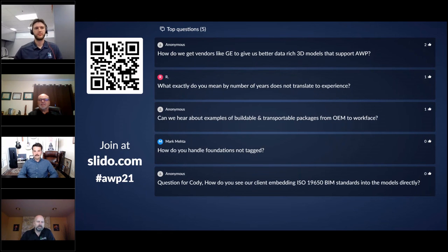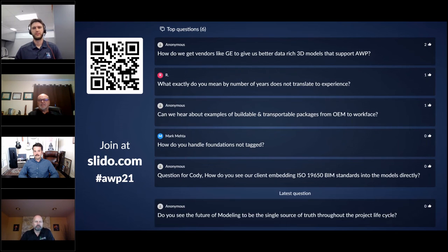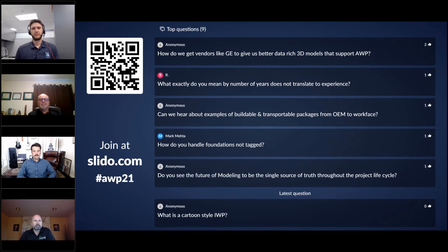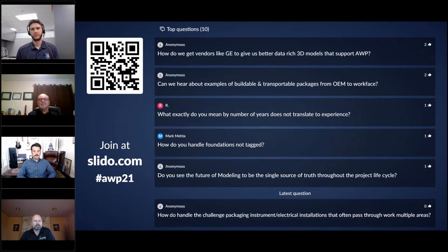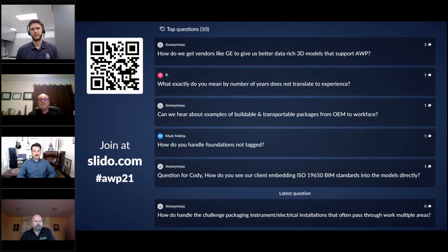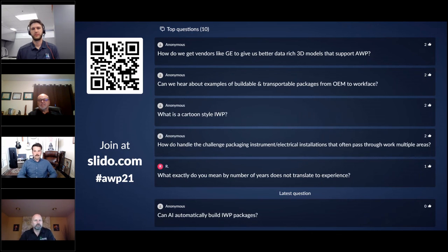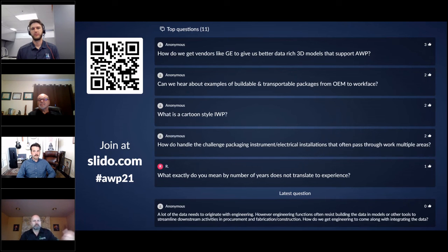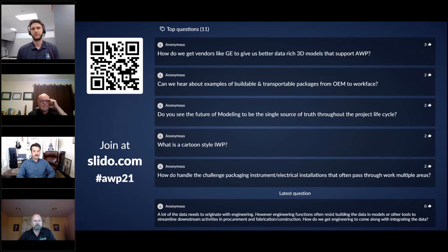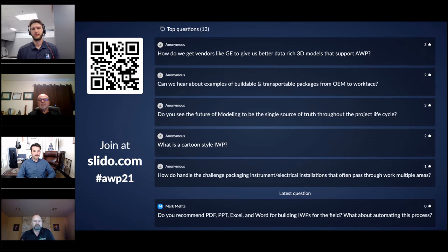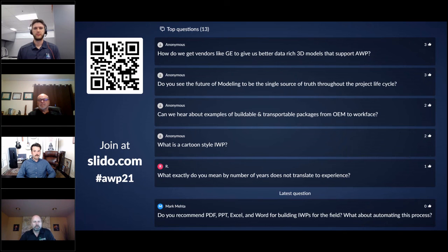If I talk specifically on the E&I side, I've seen packages as small as 20 hours for terminating a panel, and I've seen cable pull packages in the 4,000 to 5,000 man-hour range, and everything in between. The industry has got to get away from hours per package. If you're building a package for terminating a panel, you want to package the work to do that scope, understanding the intrinsic relationships tied to the termination of that panel, which then releases that work for QC to do their work. If you tie that in with a bunch of other panels just to get hours, you really are shooting yourself in the foot when it comes to productivity and effectiveness in the field. Vice versa, if you're pulling all of the cables off of an MCC, all of them, right?